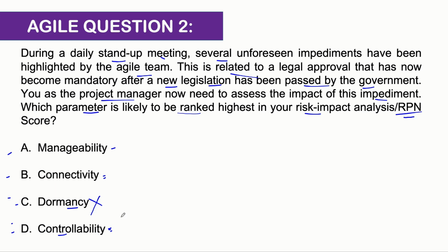It's very important. If as a project manager you are jumping into solving without data gathering, you are not a good project manager as per PMBOK. So if you know this framework, guys, it is very obvious and you can answer this question very easily. How? Connectivity, right? So what is connectivity? We talked that connectivity tries to establish, with this risk occurring in your project, which verticals of the project it's impacting. Essentially it's doing a triple constraint analysis, and not only in the triple constraint, it's trying to analyze resources, trying to analyze risks on communication, etc. So that's a part of data gathering, guys.